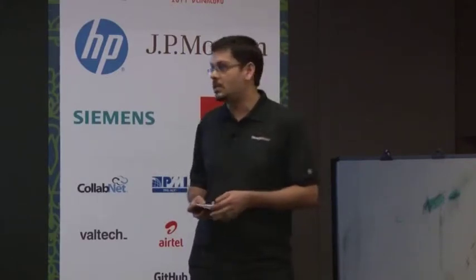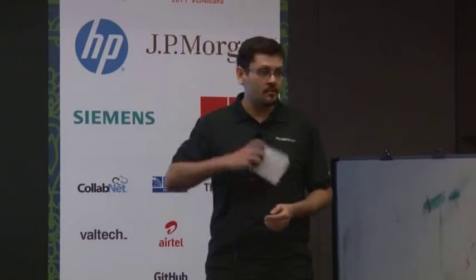It was always going to be harder to actually work smoothly. So one of the things we do now is make sure that the team can be together 1 or 2 days, or even 1 day in advance, or at least a half day in advance, before there is any interfacing with the actual client stakeholders or business stakeholders on day one.